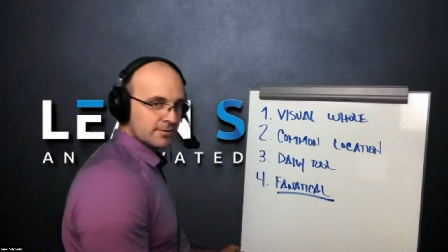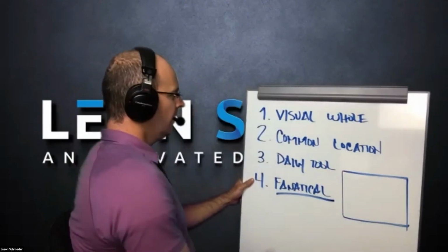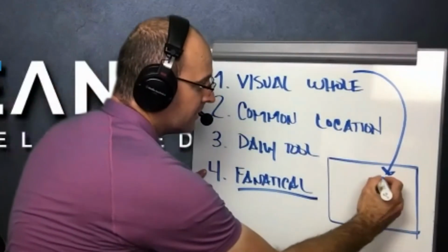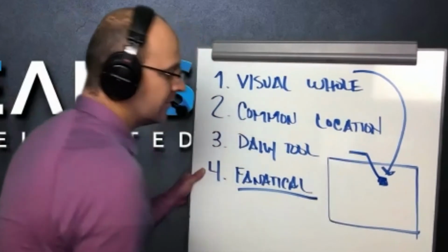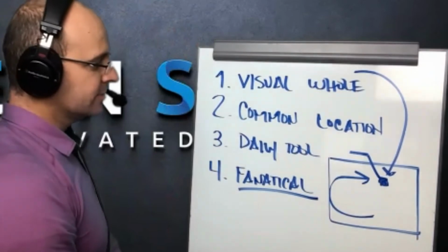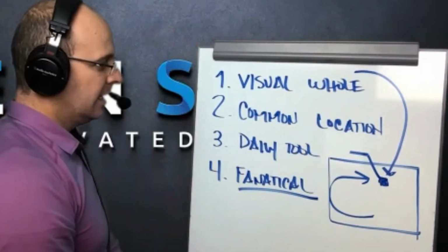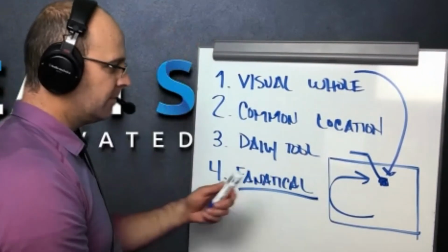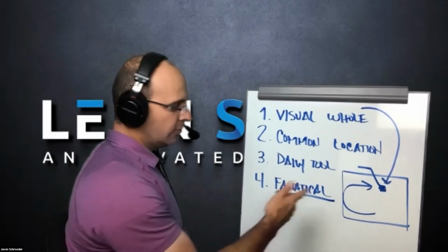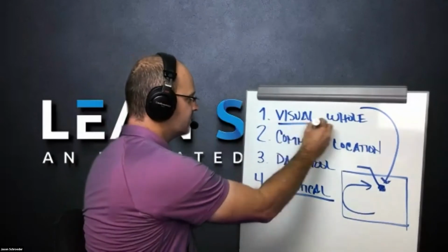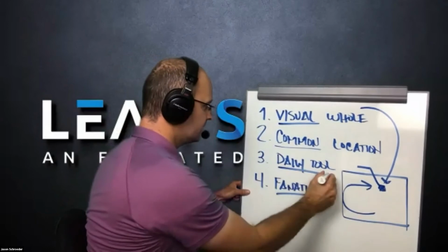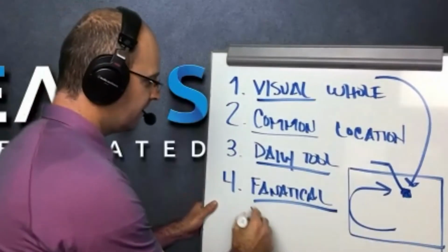In the conference room, I like to have visual maps where as soon as a roadblock is identified, I go ahead and put it on there. I put it where it goes, and I have a little leader that goes over there. As I see work coming through that map, I can see when that is going to hold us up. Every day in my stand-up trade partner meetings, or when I'm doing the trade partner weekly tacticals or the daily foreman huddles, I'll go over that map. It's visual, it's in a common location where every meeting I have, I can use that same board. I use it daily in my meetings, and I become fanatical about it, right?